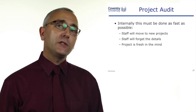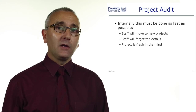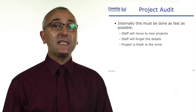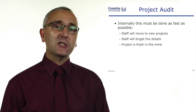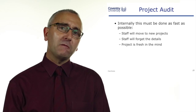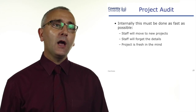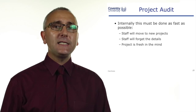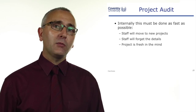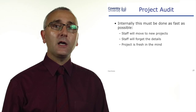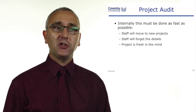This project audit needs to be done internally quite quickly while the project is fresh in people's minds, before they move on to the next project where they won't find an hour or two to come to your meeting. It needs to be done, perhaps independently, perhaps run by a senior manager or a different project manager.